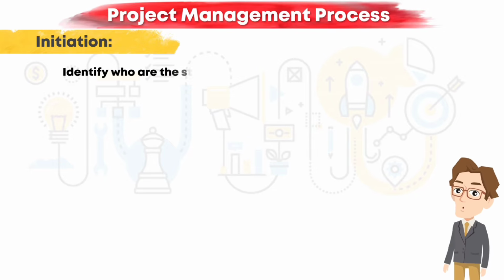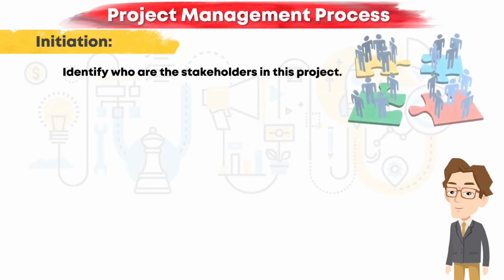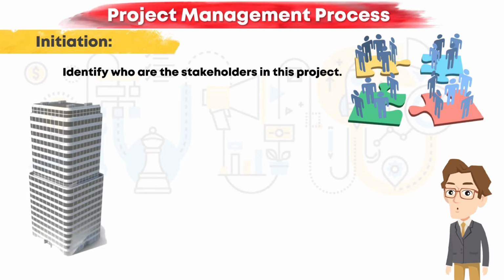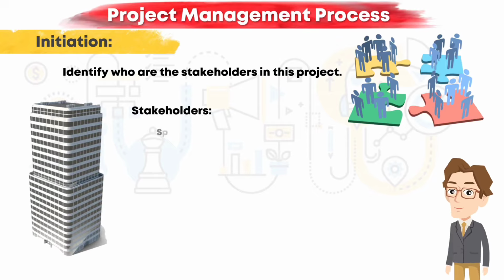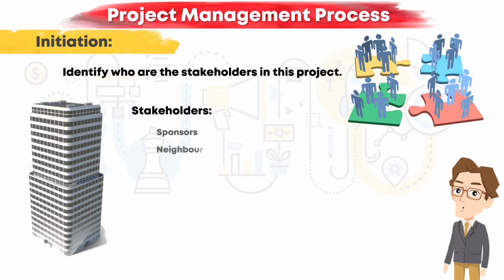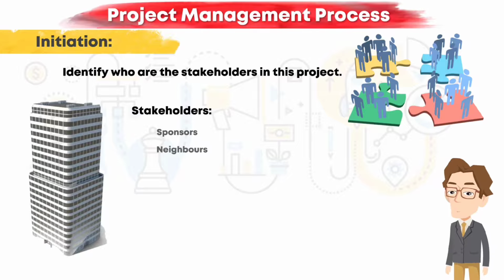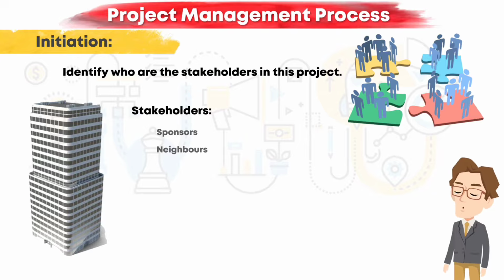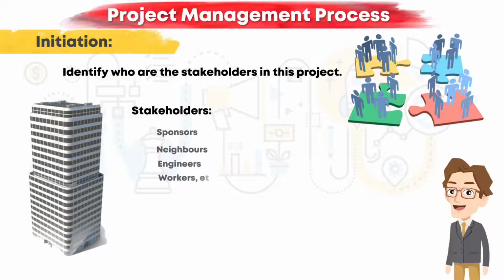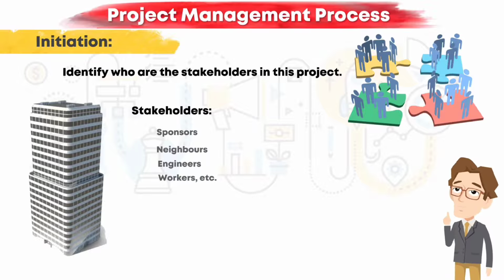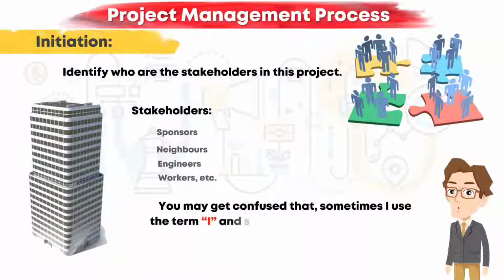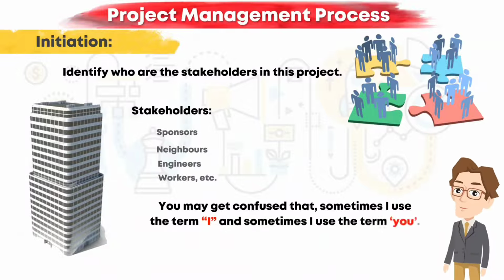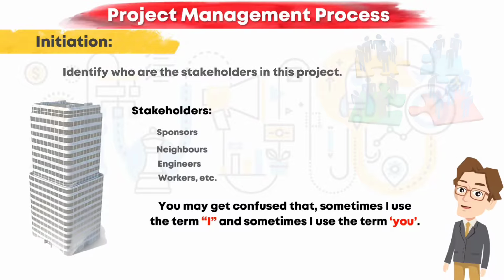Next, identify who are the stakeholders in this project. In my case, I want to build a skyscraper in a location. So, my stakeholders should be the sponsors of this project, neighbors of that land, who will be disturbed all the time due to a lot of noise, engineers, and workers associated with this project. You may get confused that sometimes I use the term I and sometimes I use the term you. Don't get confused, I'm referring to you as a future project manager.